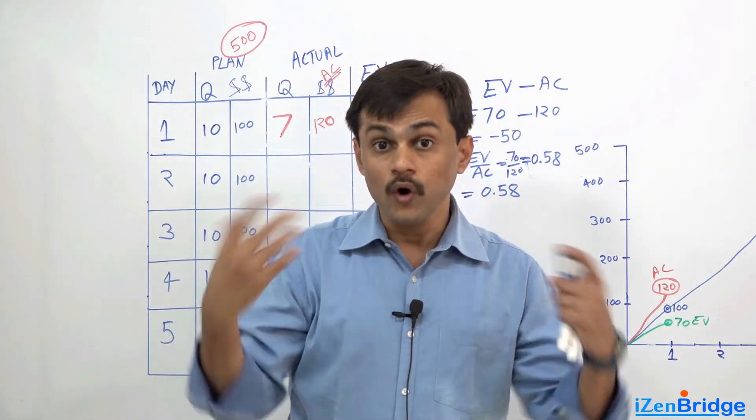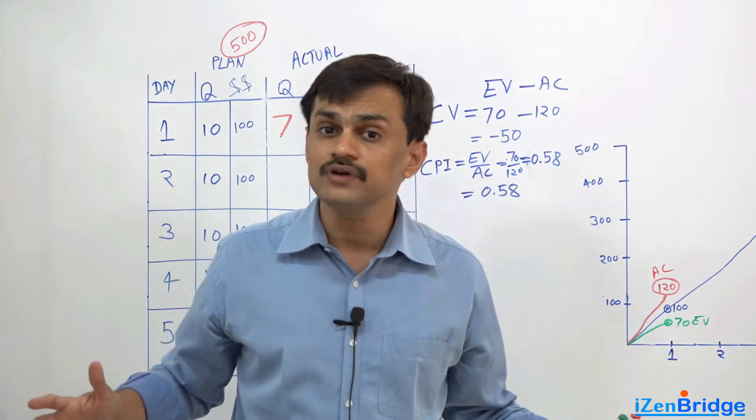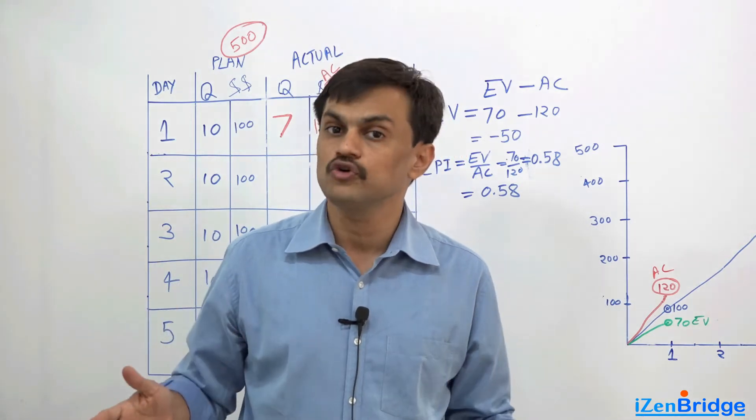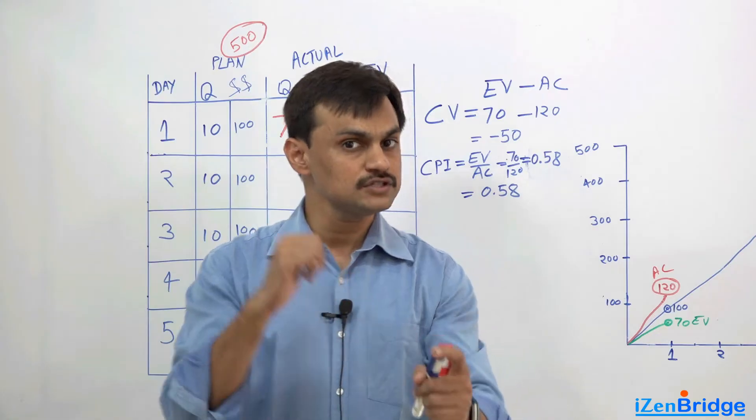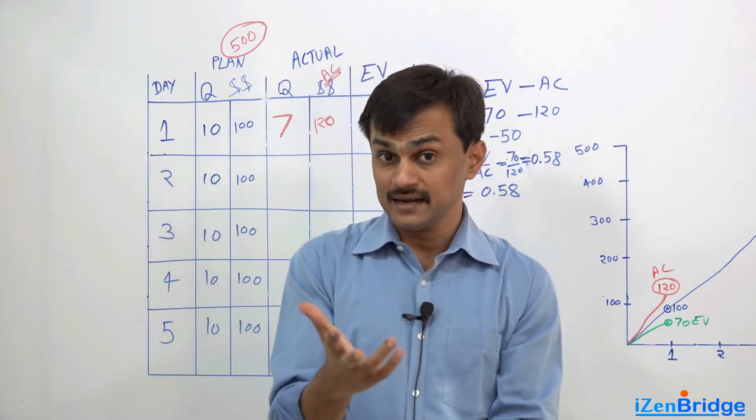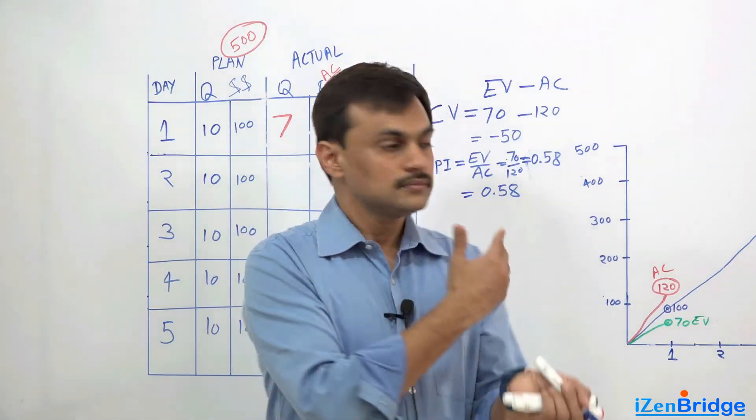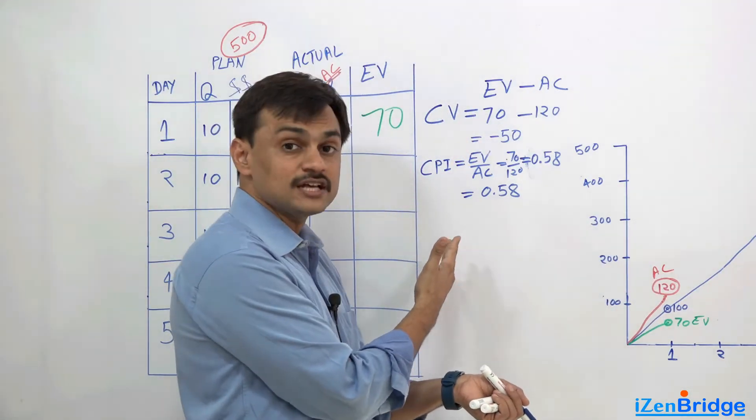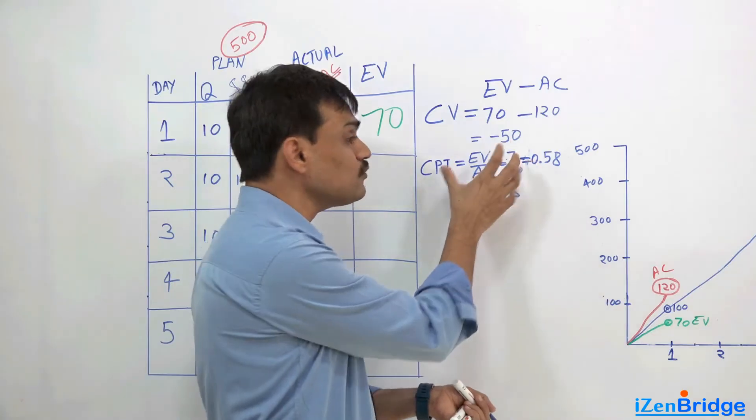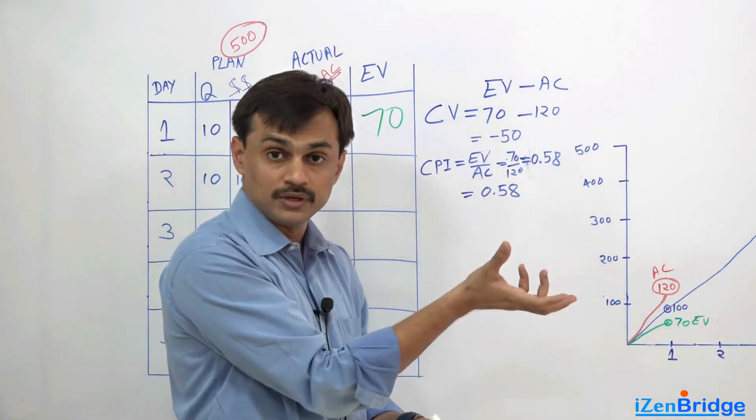If I would have got 1, it means I am getting maximum value of my money. If I would have installed 20 machines rather than 10 and by just spending $100, my cost performance index would have been 2 because my earning was 200 and my actual cost would have been 100.